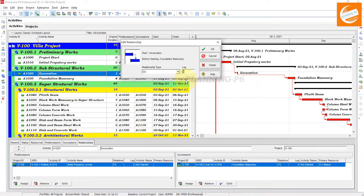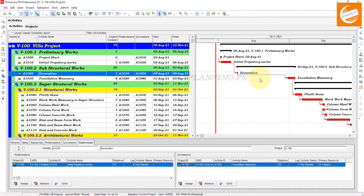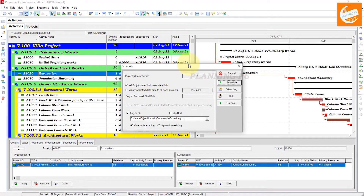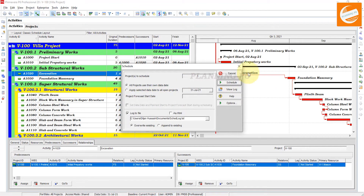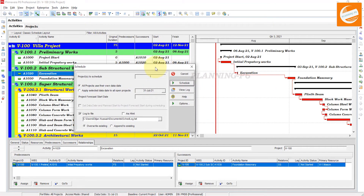For example, after three days I want to start that activity. Then we will go again to the Schedule function. After scheduling, you can see the behavior of this activity — focus on it and schedule it.